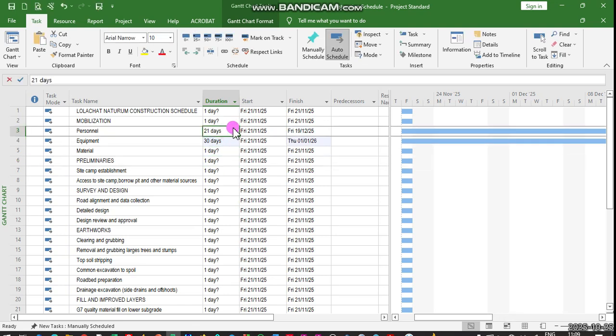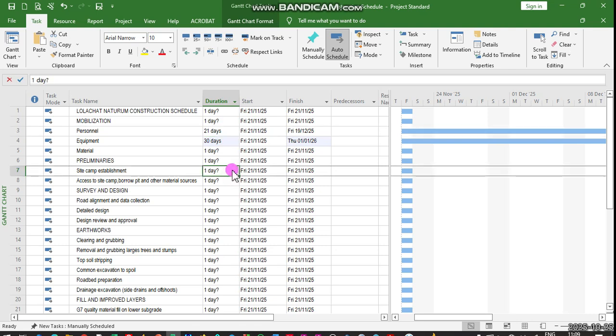You can use this arrow up and down to give you the duration, or you can type directly into this box here. It will do the same thing for you. So right now, I hope you're seeing that the question mark is disappearing. Now, MS Project is detecting the duration now as something which has been calculated by the person who is entering the data. That is why you don't see the question mark here.